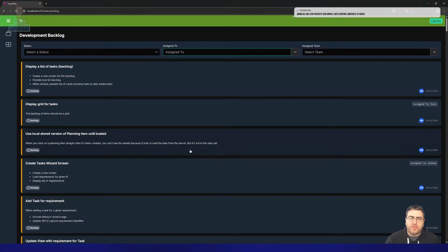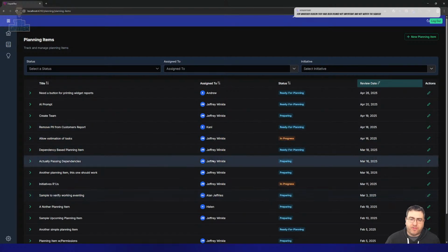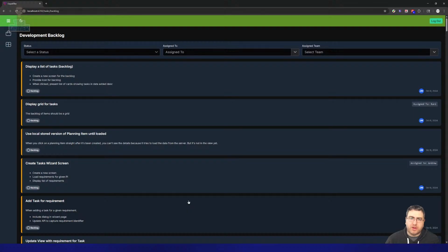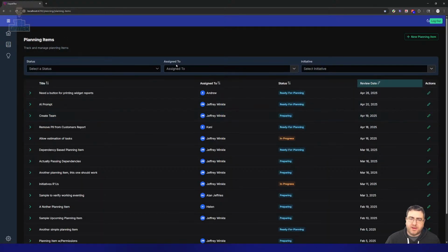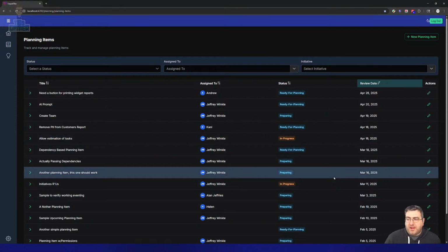If it's planned work, like if I have some technical debt that we need to tackle, I want that to be visible here. If it's we need to reorganize this code structure or we need to do this, I'd rather have it in planning over here and have them see it than have it allocated in here, because this should only be work to be done. So I wouldn't even put them into this development backlog. I make sure they're in the planning and tracked that way, so that the planning team, even if they push it out 6 months and in 6 months they review, should we do this? And then they delete it, the conversation's there to be had by all and the visibility's there.